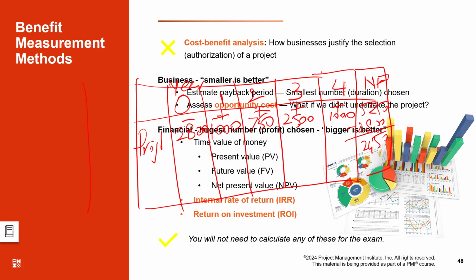Before I can get into the net present value, let us also talk about another thing, which is called payback period. This is another method. With payback period, you can look at these figures and tell me when you will recover your money, the $2,800 you have invested, when it will be completely recovered. In the first year, you're getting $1,000 back. Second year, you're getting another 750. This is 1,750.